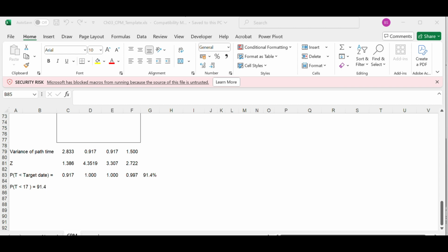Project cost management process involves three steps: estimating the cost, determining the budget, and controlling the cost. Controlling the cost is a basis in determining the budget. When we talk about cost estimation, we have to talk about the type of cost, the timing and accuracy of the cost estimate, the method of estimating, and the specific cost estimation issues.